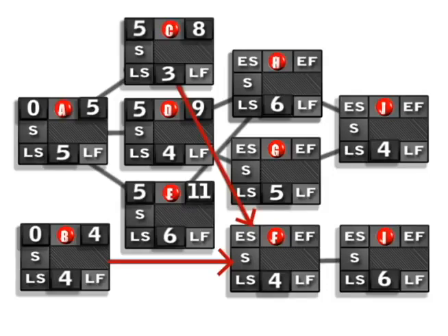You see that we have an early finish of 8 for activity C and an early finish of 4 for activity B. Remember, by definition, all of the predecessor activities have to be complete before the new activity can begin. That means that we have to choose the highest of the 2. So we're going to choose 8 for our early start for activity F.